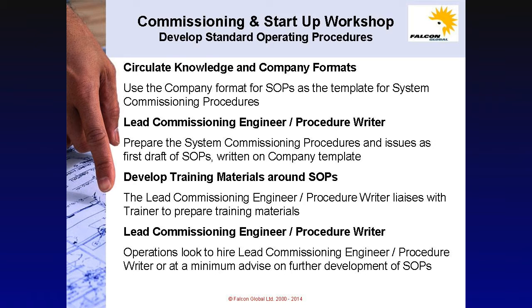Prepare each commissioning procedure and issue it as a first draft of the standard operating procedure, the SOP, written on company-headed paper. Develop training materials around these SOPs. The lead commissioning engineer or procedure writer will also liaise with the trainers to prepare standard training materials.